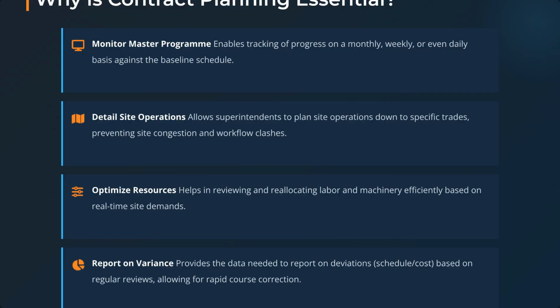Finally, we arrive at contract planning. The project is now moving forward, and we need granular detail. This stage involves making the final choice of technology and clearly defining work tasks. It requires accurately estimating the resources and duration for every single activity. Ultimately, this forms the absolute basics for developing the final working budget and schedule. For example, if you chose to use automated bricklaying technology, this is where you assign the specific operators, calculate their daily output, and lock in the timeline.